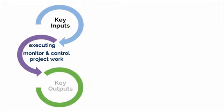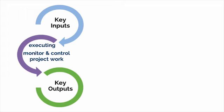Finally, one key output is change requests, because as the project manager gauges project status and progress, sometimes changes are needed and would be submitted via a change request.